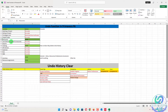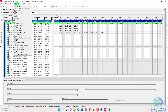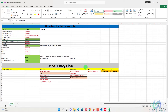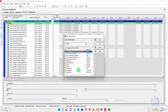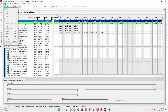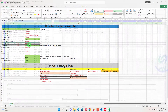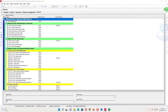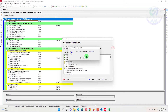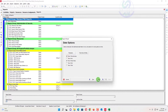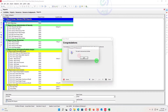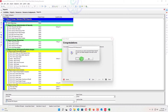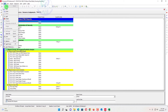Also, if you add a resource assignment it can be undone, edited, or deleted. However, for user-defined fields, there will be no undo function — if you add or delete any option in user-defined fields, undo will not work. Similarly, for reports, you will not find any undo function. If you add a new report and save it, for example as 'Activities,' you cannot undo this function in reports.